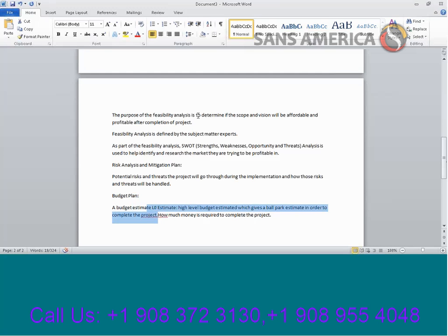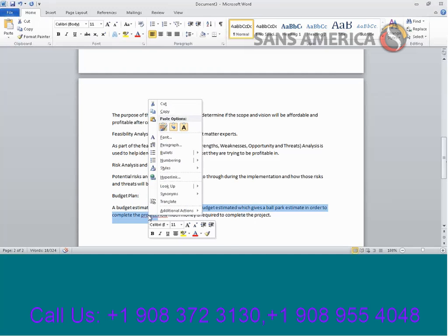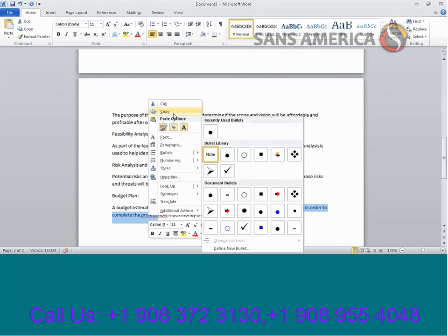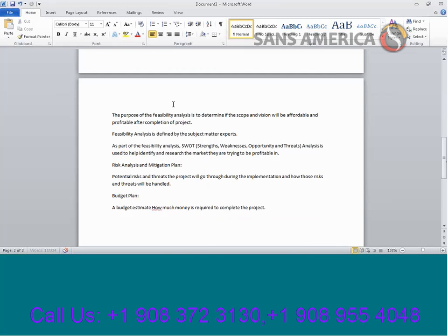Yep. So what happens is now the technology team, the business users say, you know what, I think you're asking for too much. Why do you think you would need $1 million to implement this? Give me some more details. Give me a breakup. So the breakup is given in another estimate which is called the L1 estimate.